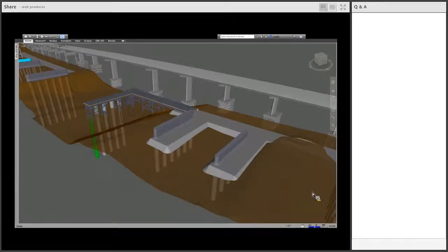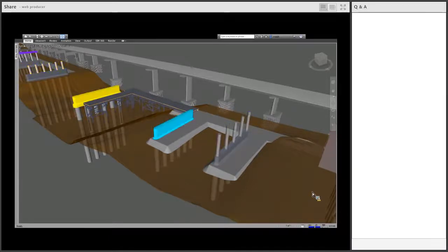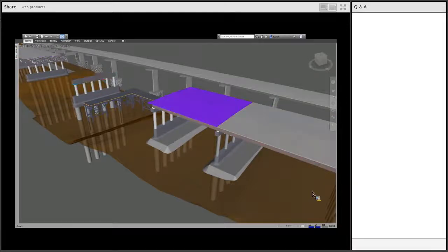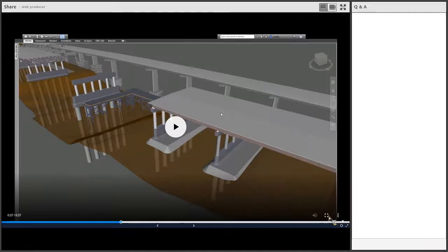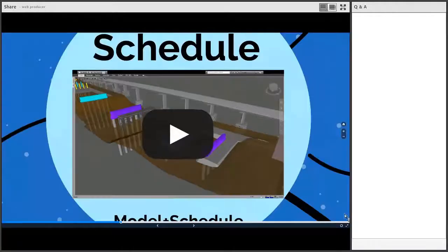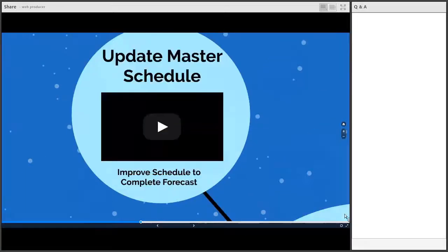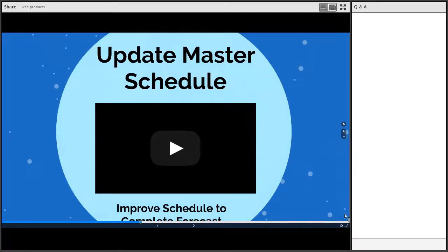That's just one example of a schedule linked to that was a portion of the schedule. Now you can compare the baseline schedule to an update, and that's an example here. So what was happening was that this element, this helical parking garage ramp, was not complete, as the baseline at the bottom says it would be, but the concrete comes far ahead of what the baseline schedule said it would be. And the tower was on level 9, the baseline said it would be on level 8.